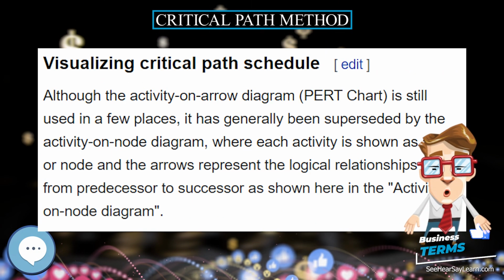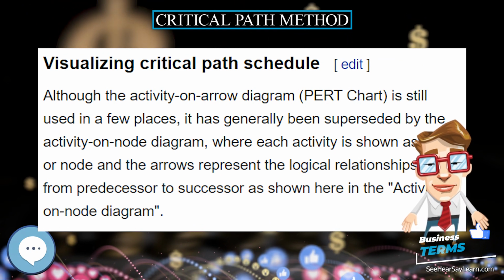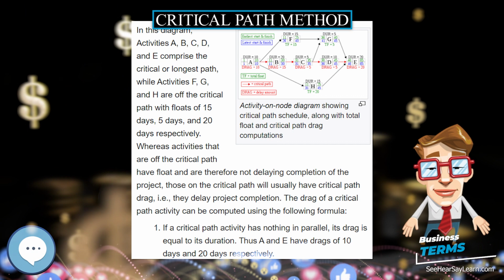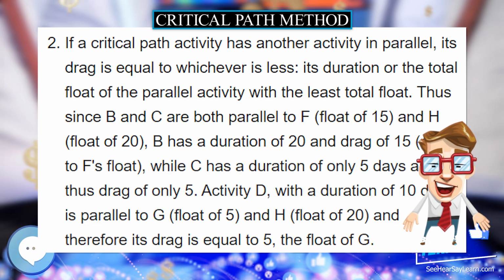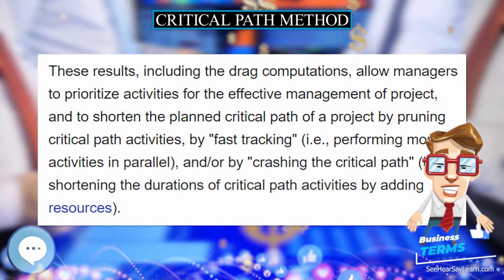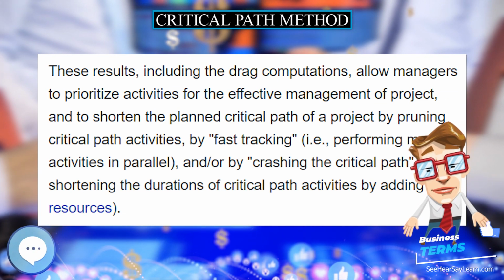A resource-leveled schedule may include delays due to resource bottlenecks, i.e., unavailability of the resource at the required time, and may cause a previously shorter path to become the longest or most resource-critical path, while a resource-smoothed schedule avoids impacting the critical path by using only free and total float.